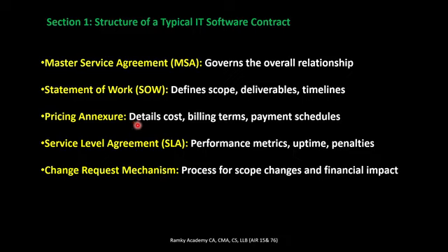The pricing annexure details cost, billing terms, and payment schedule. And most importantly, the service level agreement, SLAs: the deliverable requirement deadlines will be included here, along with performance metrics, uptime, and penalties in case we aren't meeting the service levels, like within 24 hours you have to deliver the work. If you are not delivering, penalties of 1% or 2% will be levied on the services.